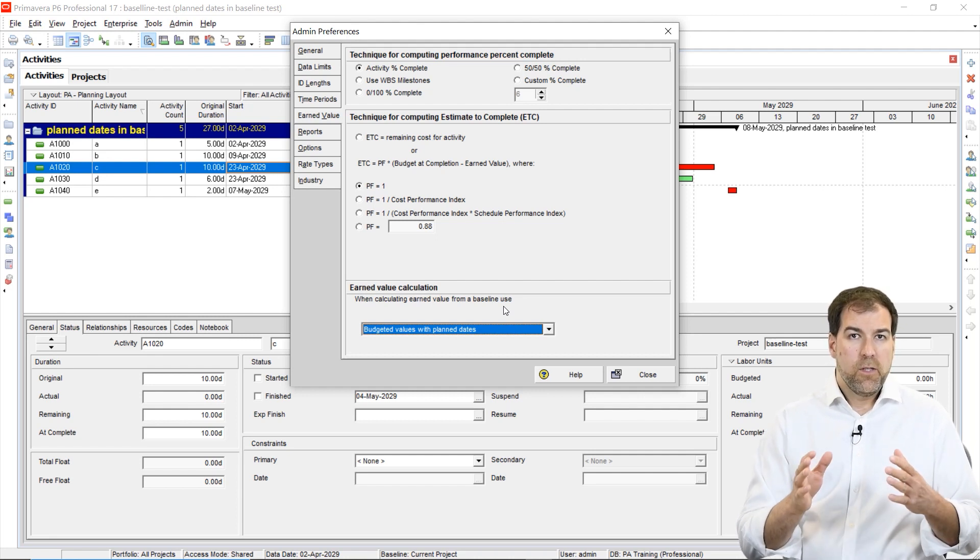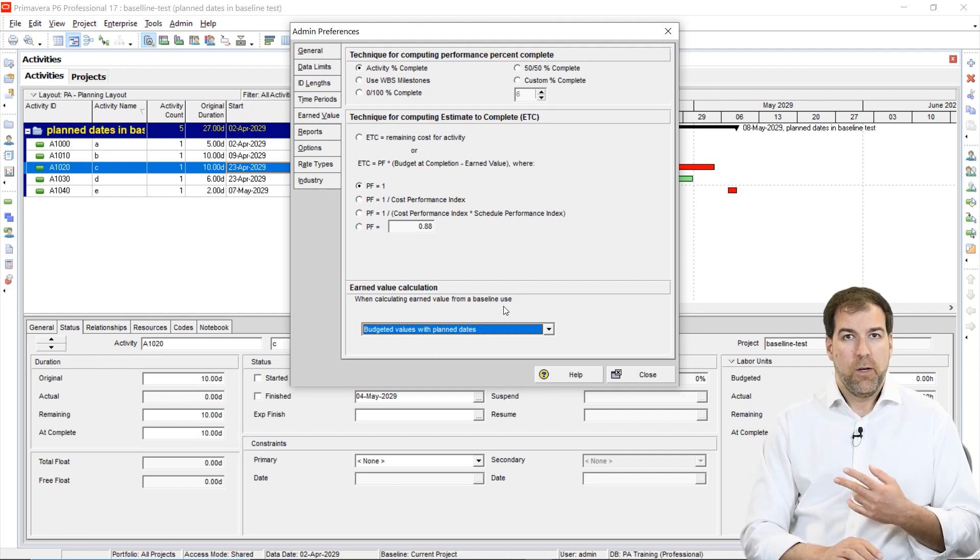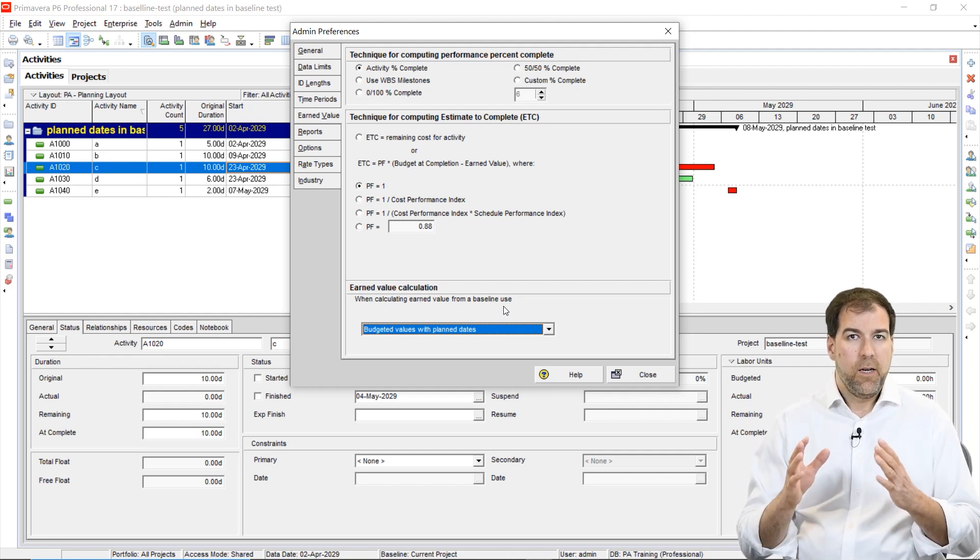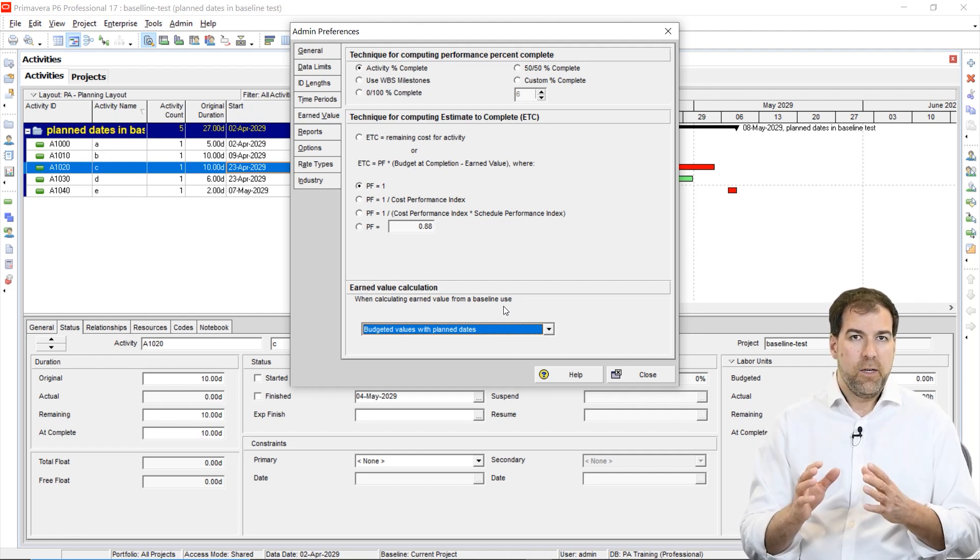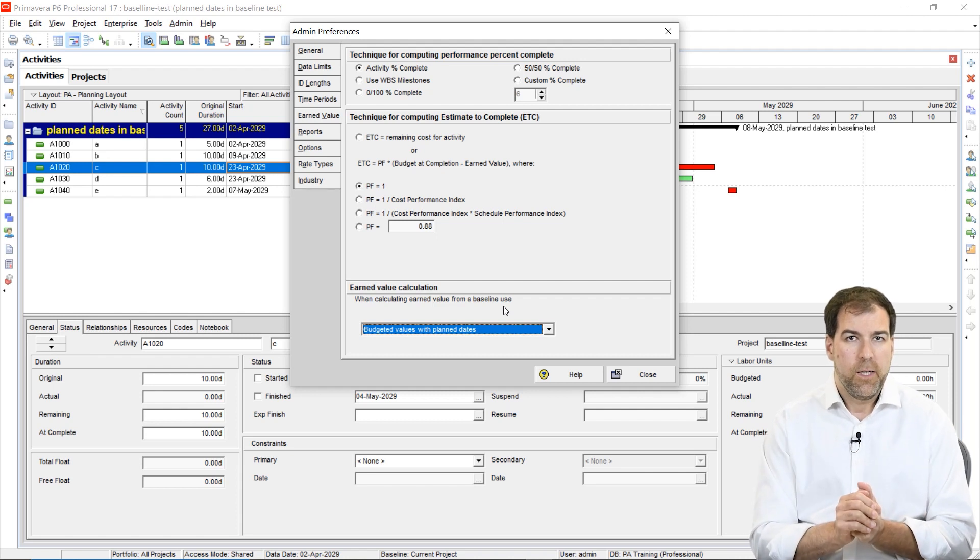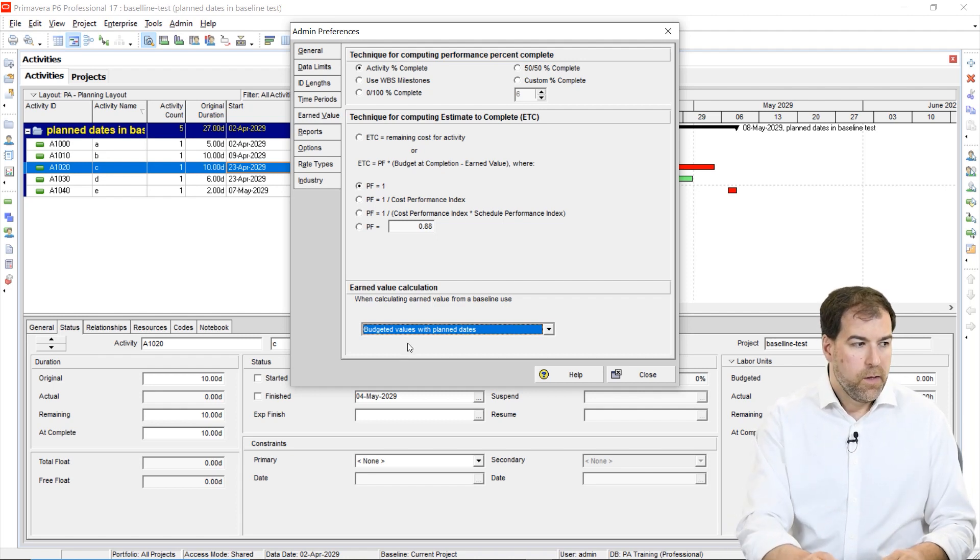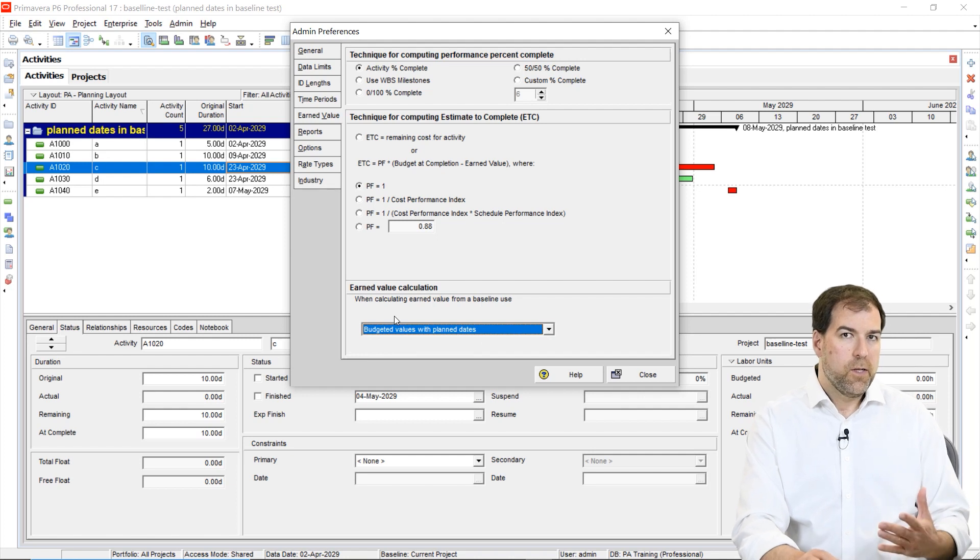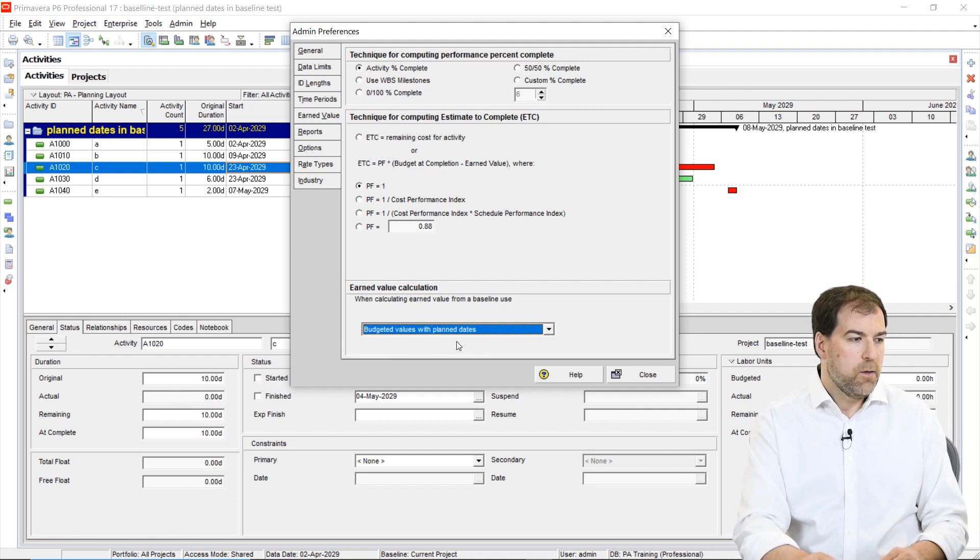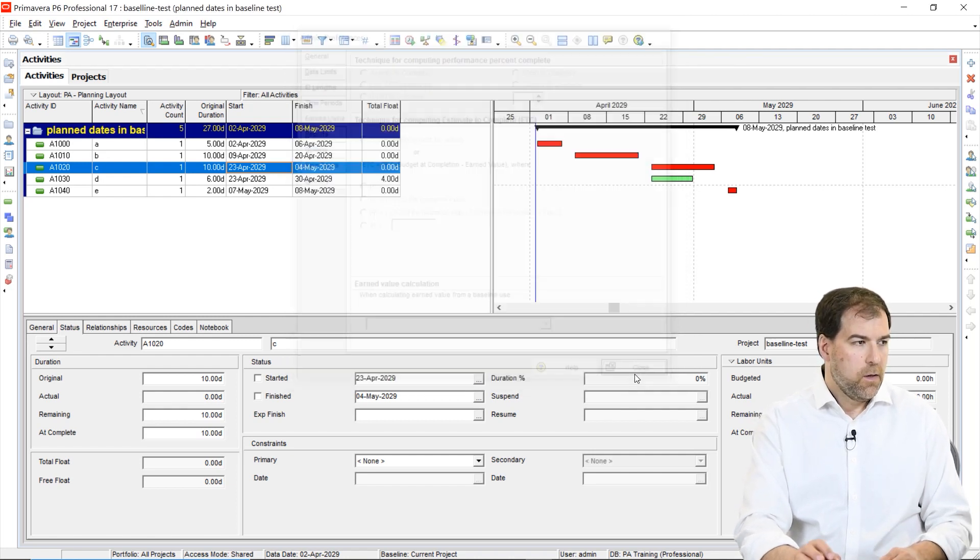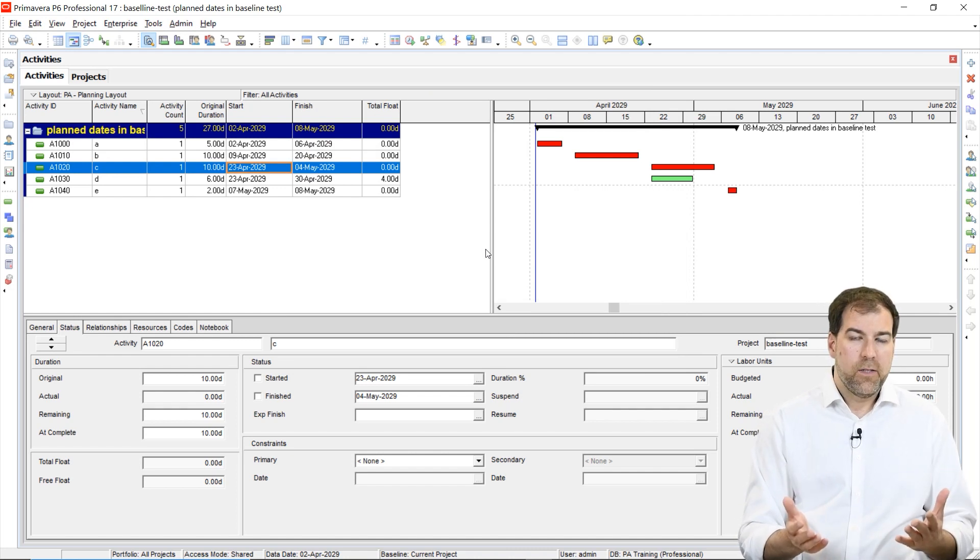So it affects planned value and it affects what shows up on our baseline, on our baseline bars. So that's what I want to tackle right now. How should we work with this? So we're going to set this to show you a couple examples. We're going to set this to budgeted value with planned dates.